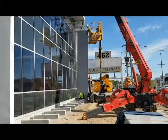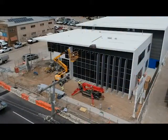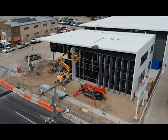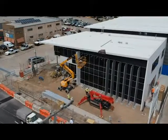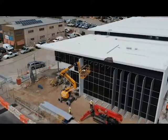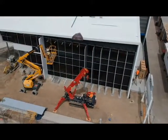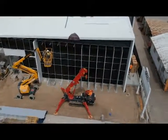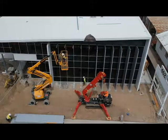The benefit with craneage these days on building sites is it gets you in and out of site very quick. You don't have to have your installers on site for long periods of time. Traditionally, things were done the long and hard way. Well, at Louvreclad, we're always thinking ahead about changing the way we apply a product to buildings. So we're thinking prefab, modular, and traditionally the job would have taken about 5 days to install.